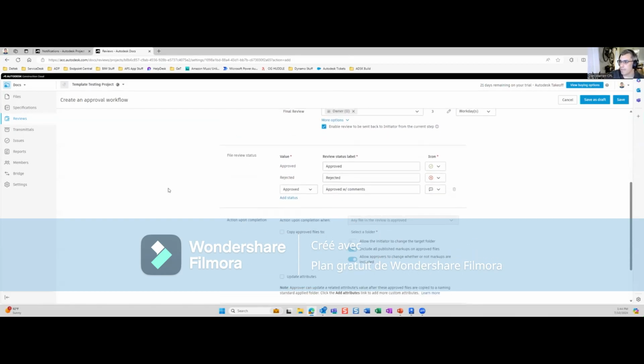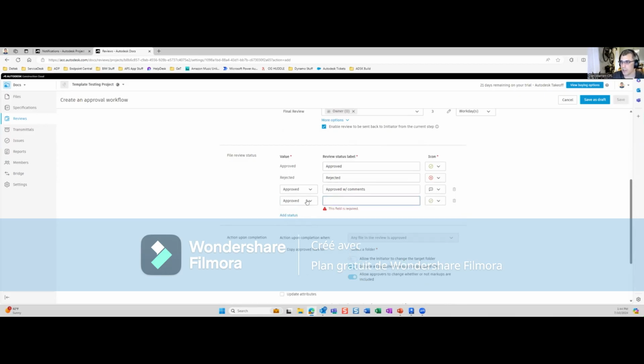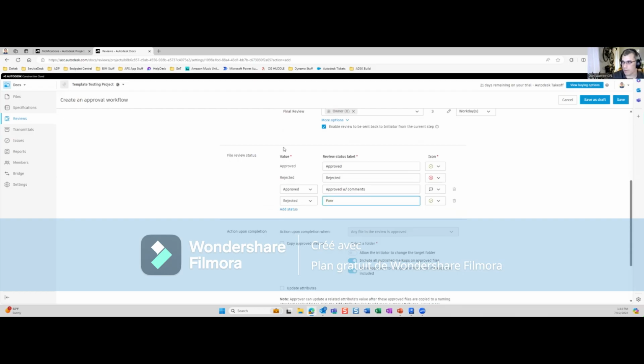And then this is where it sort of becomes a submittal process, right? You can create different values for the approval steps. So it's basically approved or rejected. And we say rejected, but we'll say, for information. And then you could change this little icon to say, hey, it's just for information. We're not approving this because approval has like a risk implication to it.